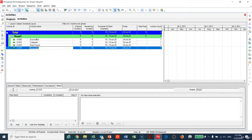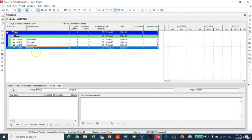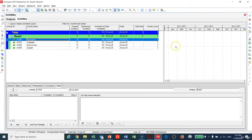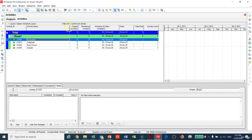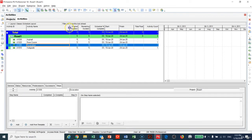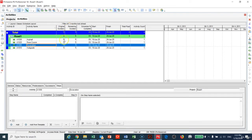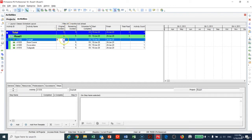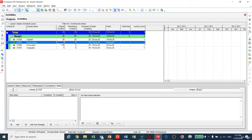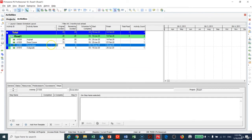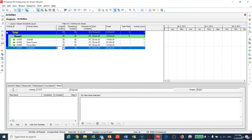I will make this one here Asphalt. So now we have created the activities. You can go and make the plus sign to add activities, or you can copy and paste what you have. I will add the original durations: 20 days for this one, 15 days, 20, and 25.